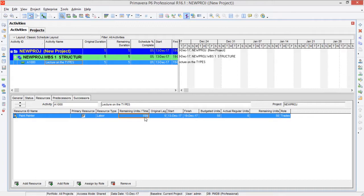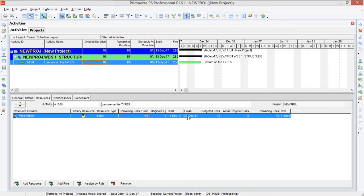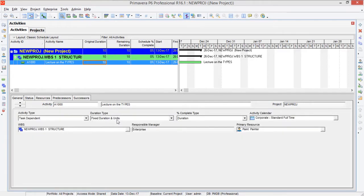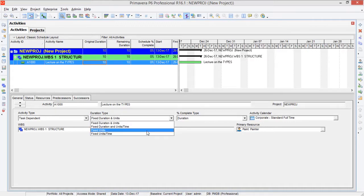Now if we reset it to 8 hours per day and change the duration instead — let's change the duration to 10 days while keeping units constant in that duration type — the thing that changes is the remaining units per time. You can observe that it has been changed to 4 hours per day. So this is what happens with the duration type of Fixed Duration and Units.